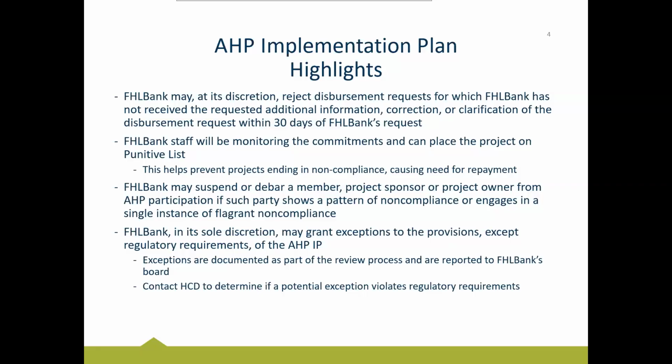There are certain things in our implementation plan that are federal regulation. We cannot provide exceptions around them, so we don't want you to get stuck in that. The main things that may cause a need for an exception are within the disbursement request. There's a specific screen, and I will show you where those are in a little while. If you are answering one of those questions no, the system is going to ask you for an explanation, and that is probably a good indicator that you may need an exception. So you can go into the system and keep track of what statements you're certifying in each disbursement request, and make sure you're checking those things ahead of time.